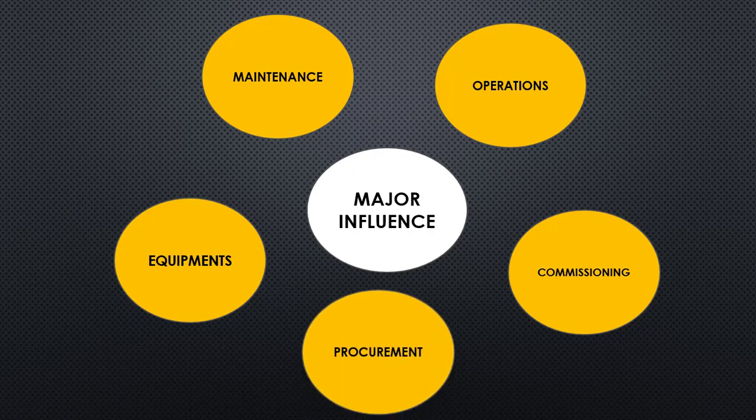The last influencing area is procurement — the process of buying or arranging material. This process has many activities: writing a material specification, sending requests to vendors, receiving and evaluating quotations, approving vendor drawings, sending them back to vendors, receiving materials, and checking whether the material meets the specification. A piping design engineer should be aware of this process sequence to check material status.